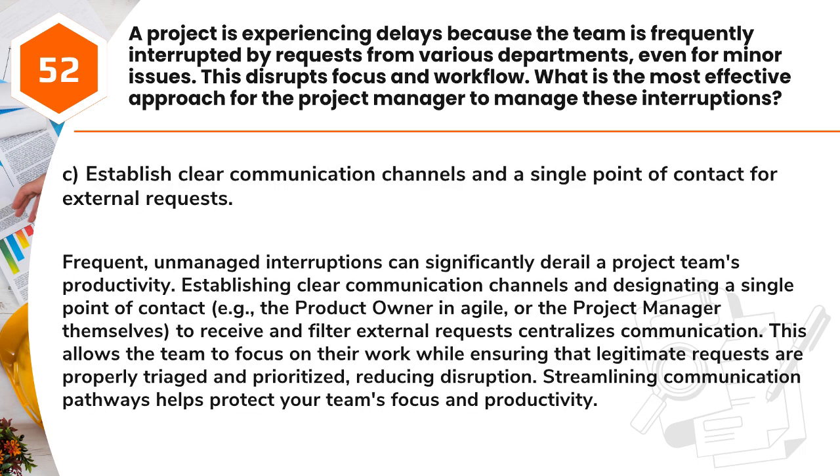Answer: C. Establish clear communication channels and a single point of contact for external requests. Frequent, unmanaged interruptions can significantly derail a project team's productivity. Establishing clear communication channels and designating a single point of contact, e.g., the product owner in Agile, or the project manager themselves, to receive and filter external requests centralizes communication. This allows the team to focus on their work while ensuring that legitimate requests are properly triaged and prioritized, reducing disruption. Streamlining communication pathways helps protect your team's focus and productivity.